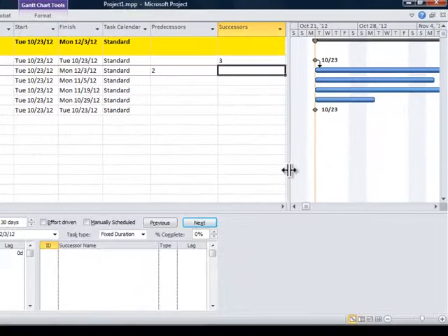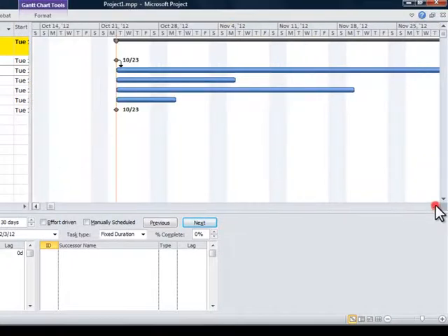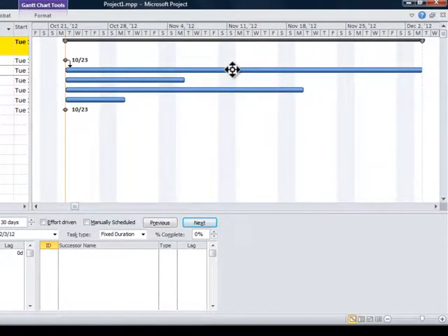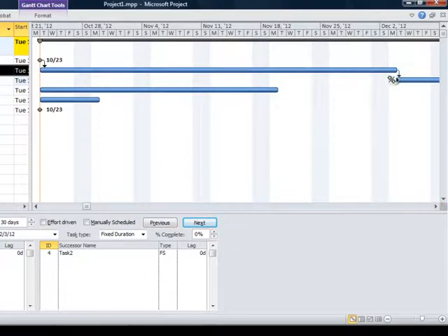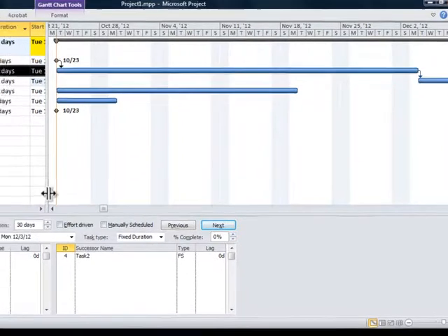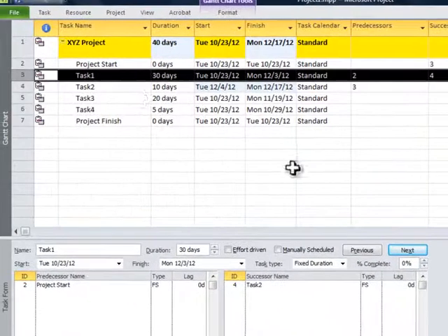The second way, you can actually go to the Gantt chart itself and hover over the activity, and you can see this four-way arrow that pops up. You hold the mouse down and drag the logic over to the next activity, or the activity that you want to tie. And it made a finish to start relationship, meaning when this activity finishes, then the successor activity can start. Okay, so that's another way that you can tie logic to activities.